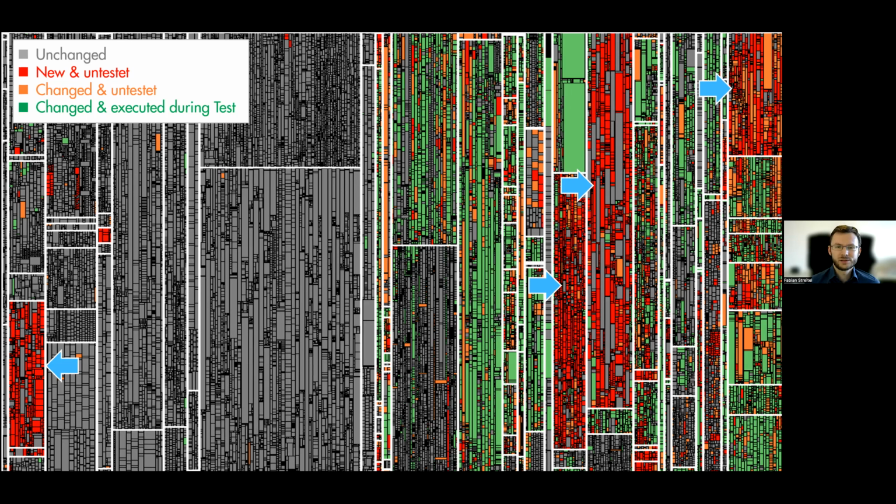And in this scenario, of course, this is rather problematic because the team was pretty sure they couldn't just ship all of this code without ever having tested it. And the release date was pretty close already. So what did they do? They postponed the release, and they scheduled some additional testing to cover all of the new functionality. Unfortunately, the time was too short to write new manual specifications for the testers in India. That takes a lot of time. And it was also not realistic that any of these automated tests would be done in time for the new release date. So what did they do?